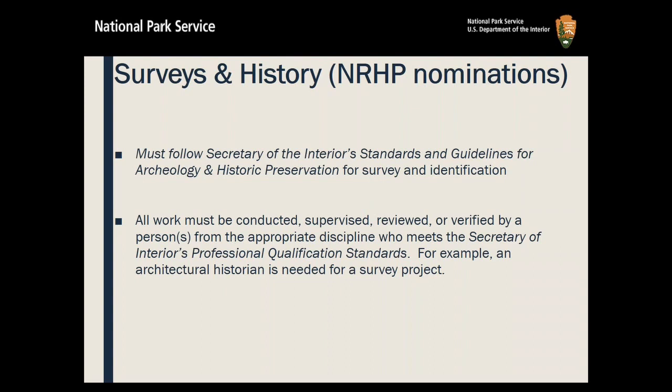You should submit the qualifications, just a CV or resume, to be approved by your grant manager, even if they are in-house and not a contractor. If submitted with your application, please remind your grant manager that the information is with the application's materials. And of course, if the contractor or person conducting the survey changes, you will need to submit new qualifications.